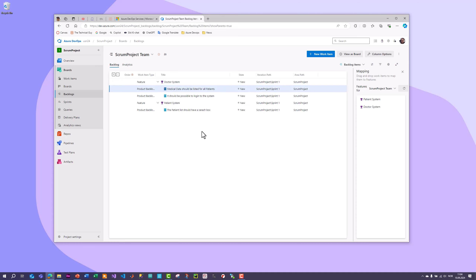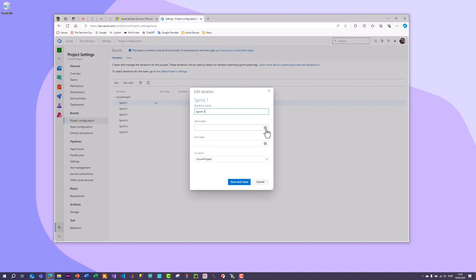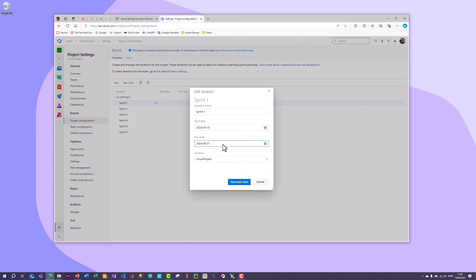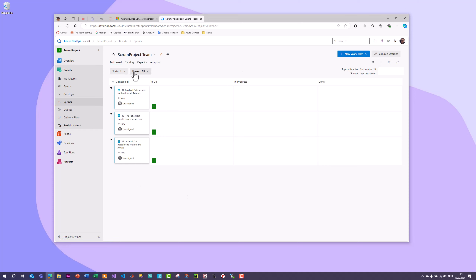Now we have created the product backlog, which is an important part of Scrum. The product backlog should be a complete list of all requirements to be developed as part of your software. The development team is now ready to start working on these items. Go back to Project Settings and Project Configuration, select Sprint 1, click Edit to rename it if desired, and set a start date and end date for the sprint. Then save and go back to Boards and select Sprints to see the task board.